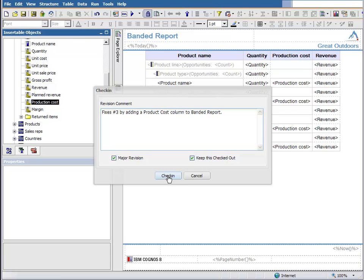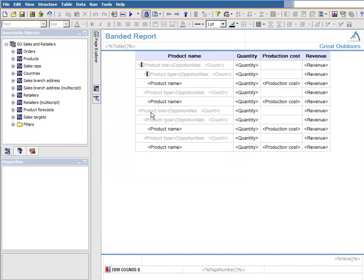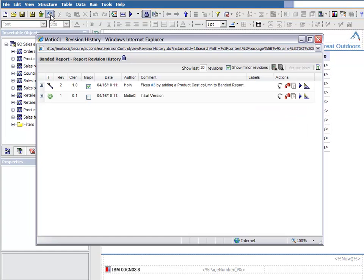Modio CI will automatically update the Jira ticket with the check-in comment and set its status to Closed. Now let's jump over to the Revision History screen and take a look at this report's history.